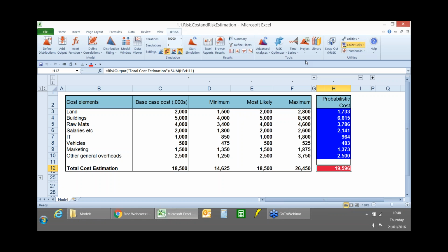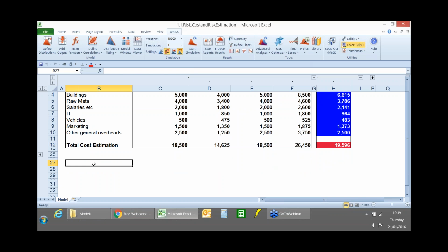and it's important to do that, because otherwise we would typically be underestimating the tails, because when things are correlated, they move in the same direction, or in the opposite direction. But when we run a simulation, if we don't put those correlations in, then sometimes things can cancel each other out. Sometimes something could be low when the other thing is high, and that's not how things work in reality. So let me just talk about that a little bit more.